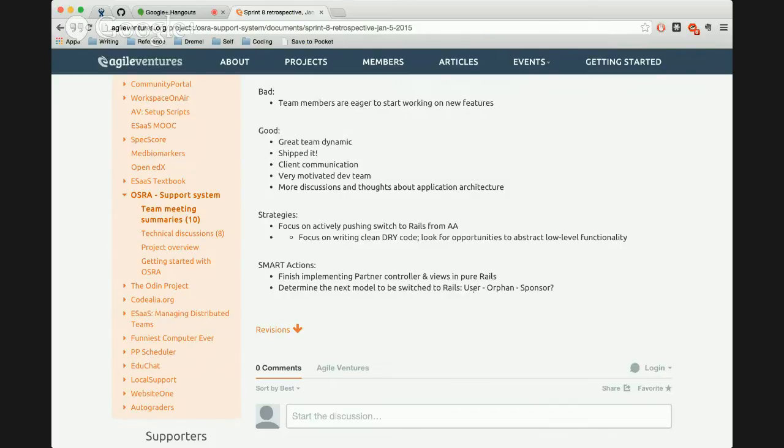Well, pending orphan list has some views that are called up during the import process. Pending orphan does not. But it seems to me that we should have the orphan model in place before we start working on the import process, and the import process hits pending orphan list and pending orphan.